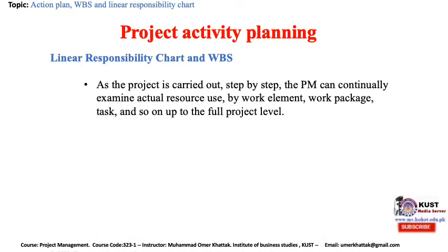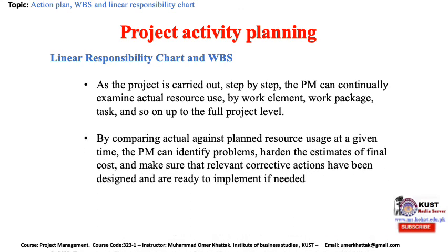As the project is carried out step by step, the project manager can continually examine actual resource use by work elements, work package, task, and so on up to the full project level. By comparing actual against planned resource usage at a given time, the project manager can identify problems, harden the estimates of final cost, and make sure that relevant corrective actions have been designed and are ready to be implemented if needed.